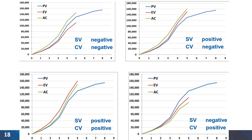Comparing planned value, earned value, and actual cost, multiple situations can happen. For example, in the first plot we can see that the earned value graph is below both planned value and actual cost. This indicates a negative schedule variance and also a negative cost variance.